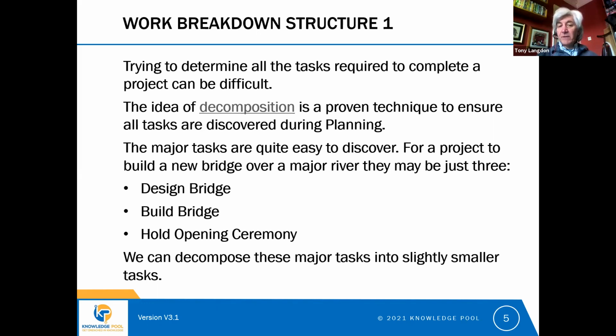And having discovered these major tasks, we can decompose these tasks into slightly smaller tasks. And that's what we mean by decomposing. We're going to repeat this process of breaking a major task down into slightly smaller tasks. And we're going to keep doing that until the exercise starts to not deliver any further value or further insight as to the tasks that need to be done. Okay.